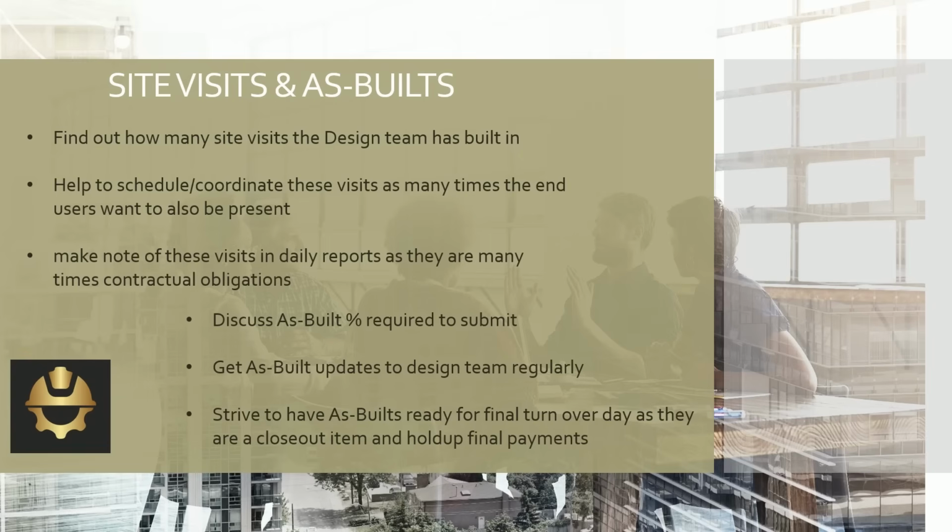And the reason why we do that, when we've gone in and we've closed projects out, it could be a year and a half long, $25, $30 million project, and the design team has never received any as-built updates. And so when they formally receive those from us at the end of a project, and substantial completion is only a couple of weeks away, the design team has received 2 months worth of as-built work, and you're behind, and there's nothing that you can do to make that better.